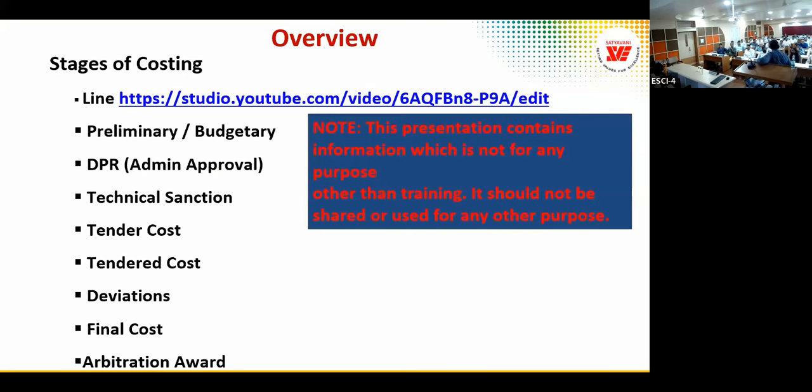Next, regarding the DPR cost reduction you mentioned, it would be compensated in 10 days, but would it affect the quality or quantity? No, it's only rate, sir. We have manipulated only the rate. See, as per the DPR consultancy award, the DPR should be prepared based on DSR. If we prepare as per DSR, there is no market variation index available for that location. So my DPR cost is coming low.